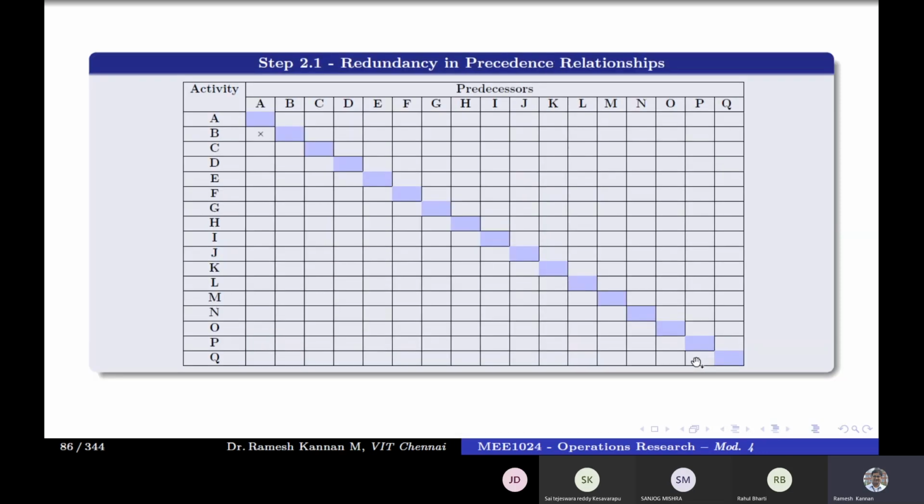Okay, I'll just repeat. We have come across this point. Then we'll go to the corresponding one and treat that as an activity. From the table, we'll see what the predecessor of activity P is: ADK. Then come back to this row and circle that ADK, which means that we have eliminated it from our predecessor relationship. We know that activity Q has P as predecessor, which means it is invariably understood that ADK is also a predecessor. So we don't need that, we only need the immediate predecessor. Once that is done, this iteration is over.